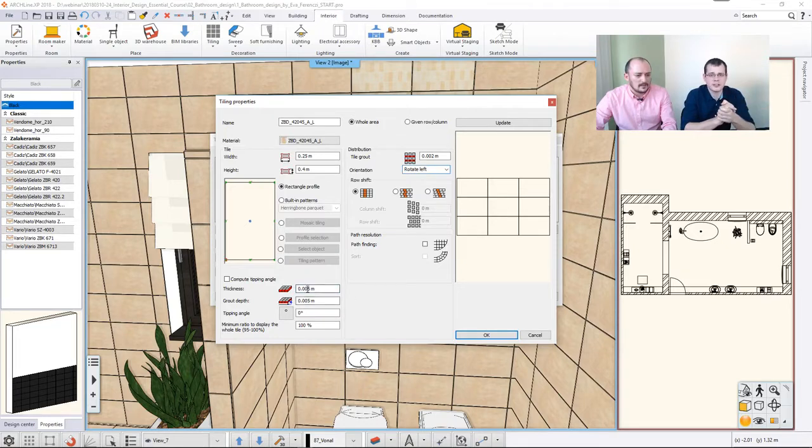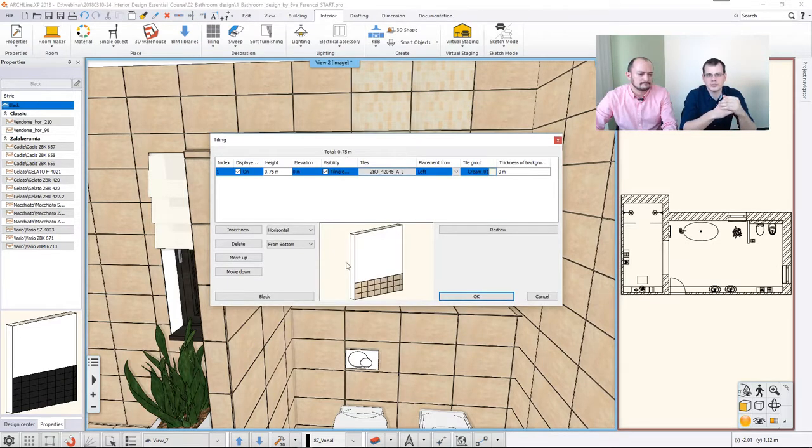One example I can think of is externally for a pavement, for instance, or if you want to have a plinth around the house where a certain kind of item should be used for that purpose. These tiling tools are very good for that because then you have an exact grasp on how many of them are used, and that is very good for cost estimation, I think, because that way you can keep track of the amount that you have to order. That's one example I can think of.